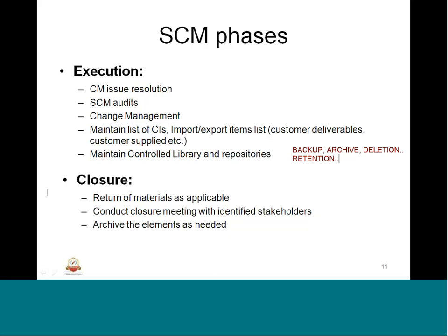Lastly, what we are going to do in the SCM phase is the closure. Once all the project activities are done, we are going to have the SCM closure. So, return of materials as applicable. We are going to return them either to the customer or to the vendor. If we have rented out any power supplies or similar material, we are going to return them. And conduct a closure meeting with identified stakeholders. We need to conduct closure meetings of the project.